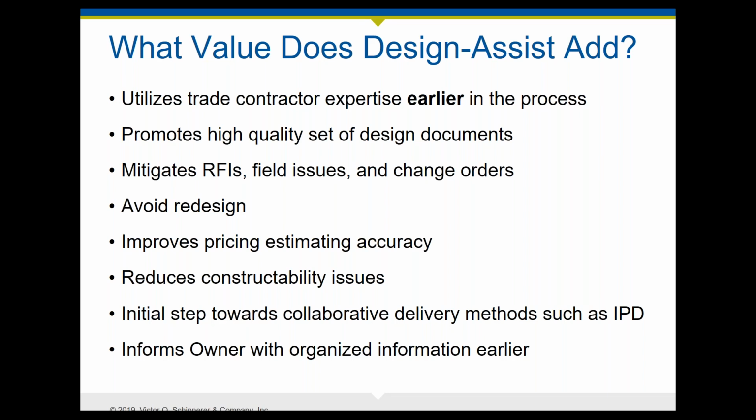In design assist, usually the subcontractors and general contractors attempt not to assume design liability because they're only providing advice. They assist the architect and engineers of record with input as the design develops. They understand the project goals and priorities, and they assume some degree of ownership of the design. But their attempt to avoid liability for their design input often is not clear.